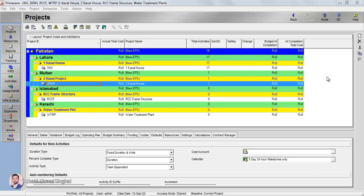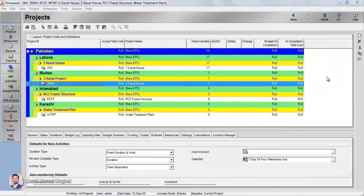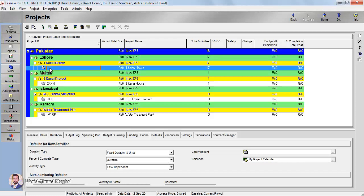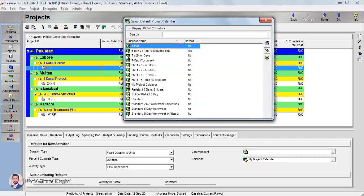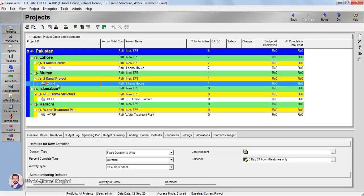Before going into the projects, in the previous tutorials of Primavera we defined calendars — specifically a standard calendar. We have to assign that standard calendar to our project. For the One Canal House project, there was some other calendar or the default standard calendar assigned. We need to assign the calendar from the list of calendars — the one we made — and click Assign.